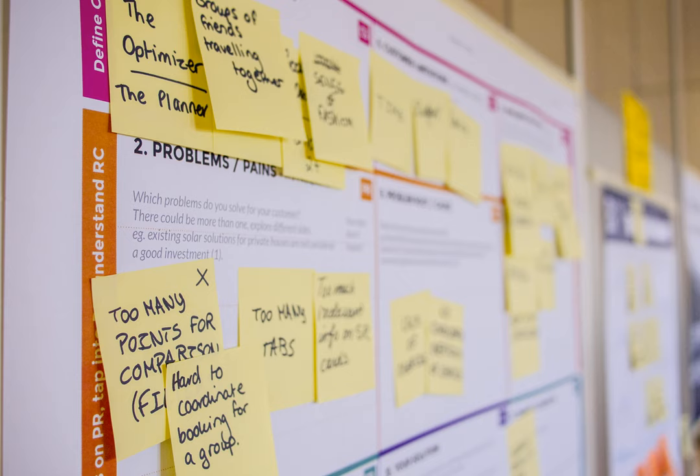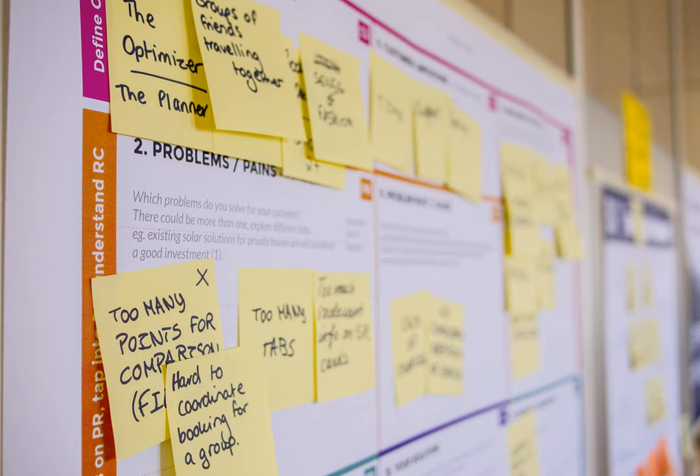The scrum guide says, the sprint review includes the following elements. Attendees include the scrum team and key stakeholders invited by the product owner. The product owner explains what product backlog items have been done and what has not been done. The development team discusses what went well during the sprint, what problems it ran into, and how those problems were solved. The development team demonstrates the work that it has done and answers questions about the increment. The product owner discusses the product backlog as it stands. He or she projects likely target and delivery dates based on progress to date, if needed.